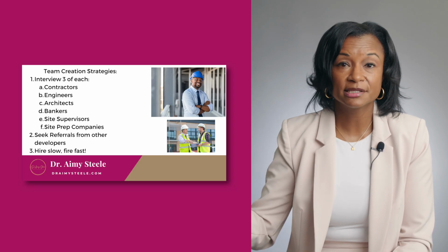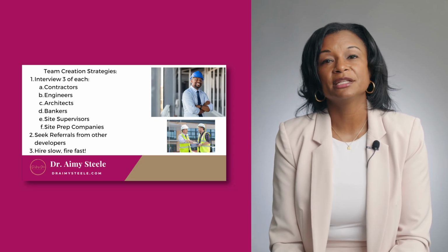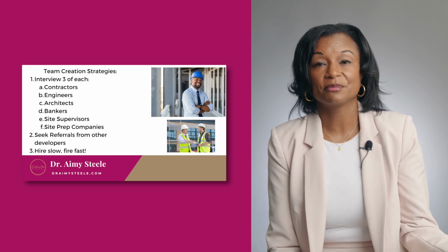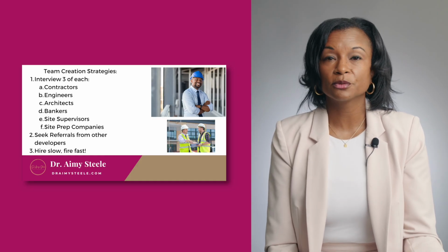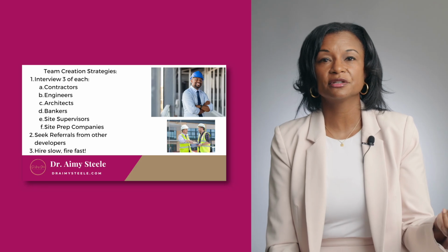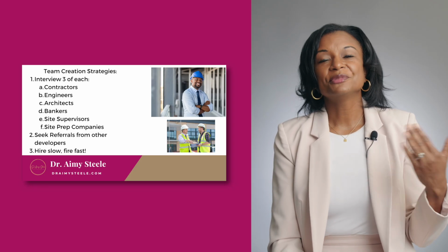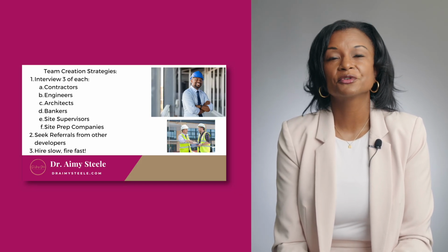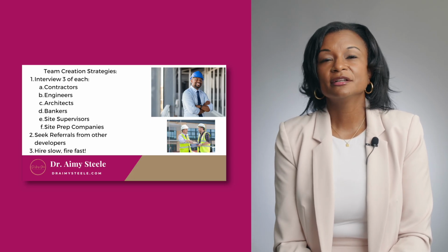Site prep companies basically get the property ready and they get it up to pad ready. Pad ready means you can put a concrete slab on it and build on top of it once the site prep company finishes. So they've laid the power lines, they've secured the water in place, got the sewer in place according to the plans that were developed on the engineering plan, and they are ready. They make the land ready to go. So be sure you interview 3 different site prep companies so that you can maximize the savings for you or for your clients.